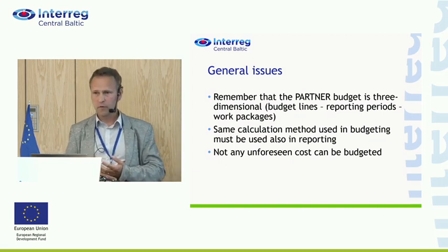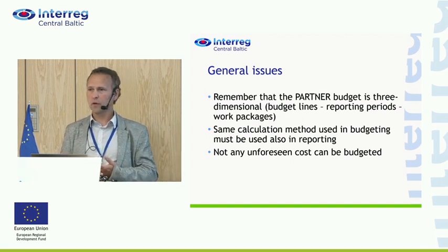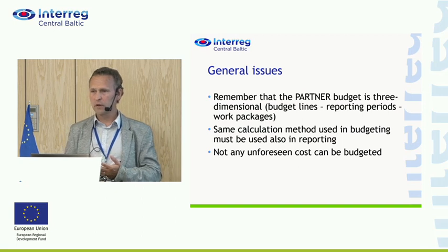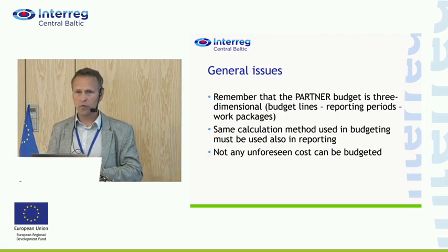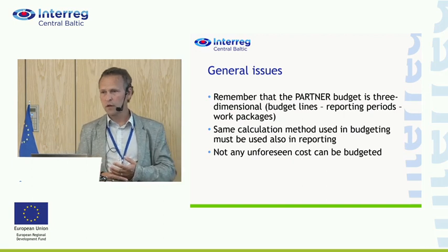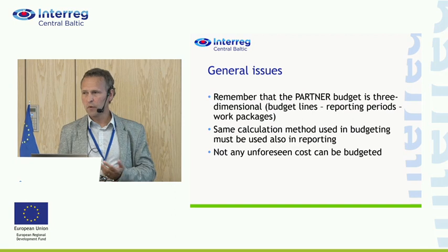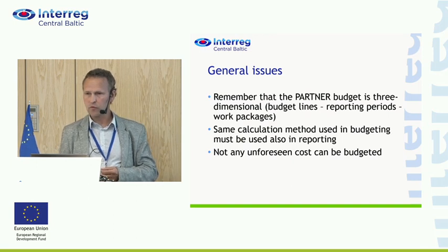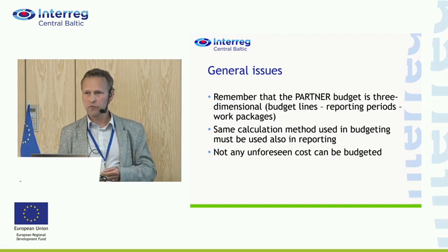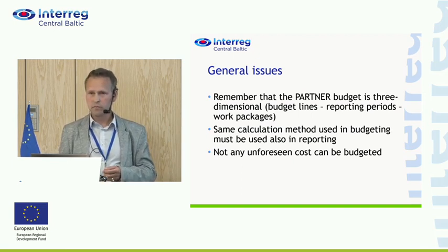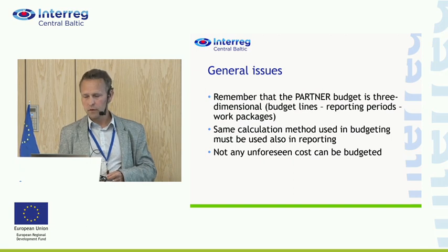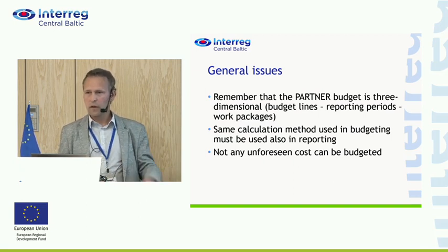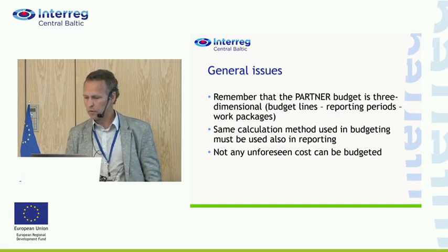Calculation method. If you write something in the application, then remember that the same method, the same calculation you have in the application, you would need to report later on as well, so that it would be really understandable what you planned, how much you did, how much you spent. And one note: we don't have a sub-budget line like miscellaneous or something like that, so you more or less need to plan all your activities and plan finances for these, not something like etc. and then just leaving some open budget line there.